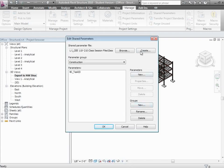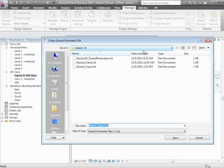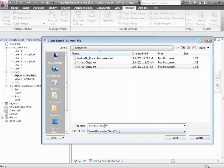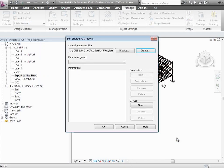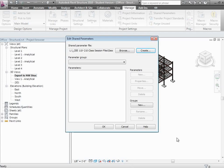I'm going to start by creating a shared parameter and then associate it with those elements. I choose shared parameters and create a new shared parameters file. The shared parameters file is really just a text header that's going to explain which values I've added. It's just text headers that describe the different columns. We need that around so we can transfer the information between different programs.